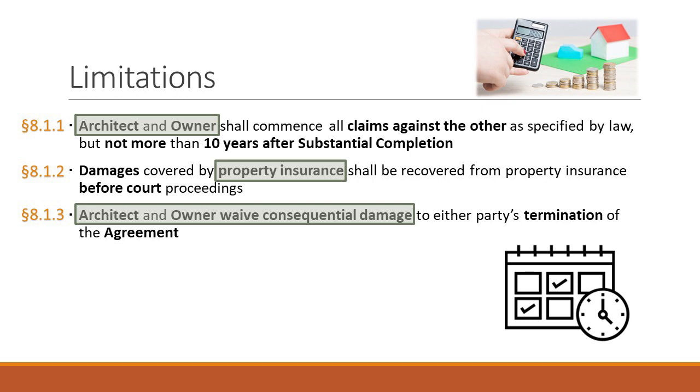So if you're in Illinois, this would limit it to the 10 years, even though the statute says 14. So when I'm an owner, when I represent an owner, I strike this 10-year provision, and I just say within the period specified by applicable law, and I strike the 10-year provision after that. But generally, it's saying at the top of the longest you can wait is 10 years. So that's what that says. It creates a contractual statute of limitations.